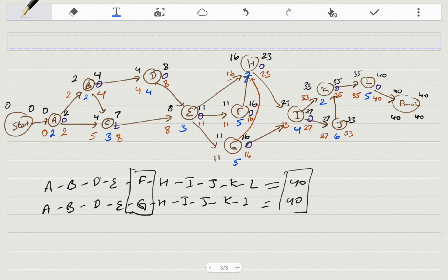So if all the values are exactly the same, only F and G are the only thing to check. If you look at the numbers, the variance value for F is 0.44, whereas G has 0.11. So if you take this critical path instead of this, we'll have the higher variance. Again, even if you use both, you'll get the same answer anyway.